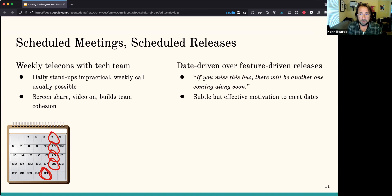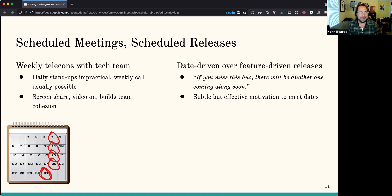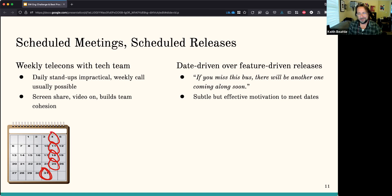I'm a strong believer in date-driven over feature-driven releases. This is a really subtle but powerful technique because it allows you to say, 'You missed this bus? No big deal — there's gonna be another one coming along soon.' That ends up being a really subtle but powerful way of getting people to make dates, because it's no big deal if you miss this one — there'll be another one. This feeds into the fact that there often isn't a strong authority when you're spread across different institutions. I'm not anybody's boss, so I can't force somebody to do something. If you're feature-driven, you tend to be tempted into letting a release date slip because you're waiting for some feature or fix, whereas if you say it just happens on a cycle, it can be very effective.